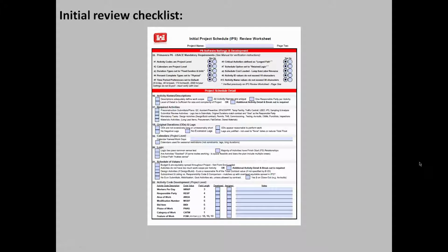Your estimation of percent complete is closer to what the truth is when you have shorter durations. However, on the opposite end of the spectrum, you do not want every activity to be detailed to the day. The activity duration is dependent on the type of work represented by the activity and how detailed it needs to be to monitor progress. For instance, a 20-day activity for steel placement may not be detailed enough for you. You might want to consider breaking it down by column lines. The key is to keep the schedule a usable progress monitoring tool.